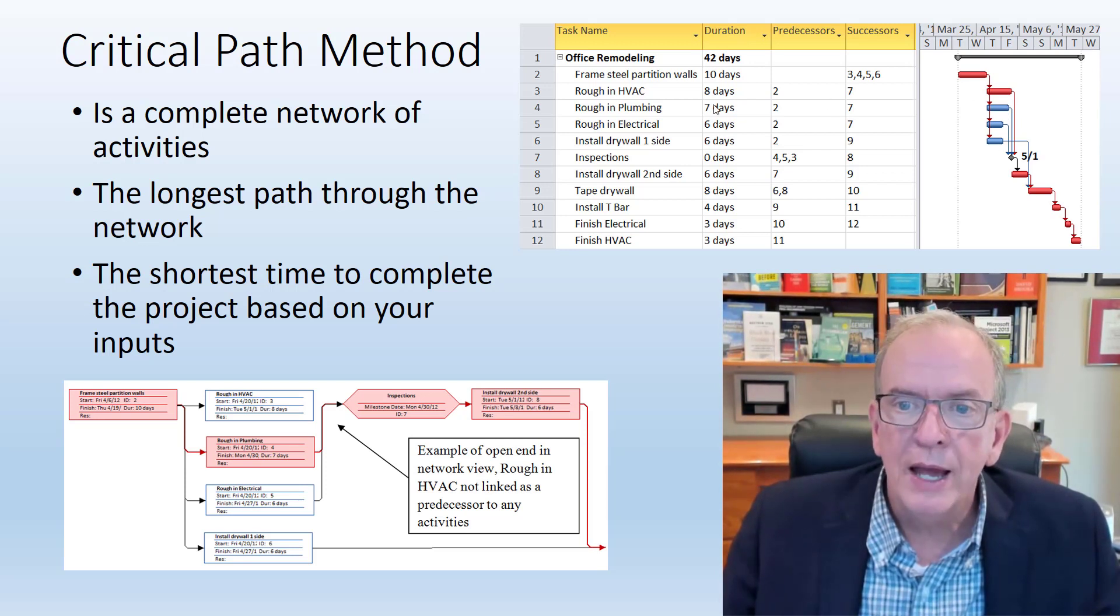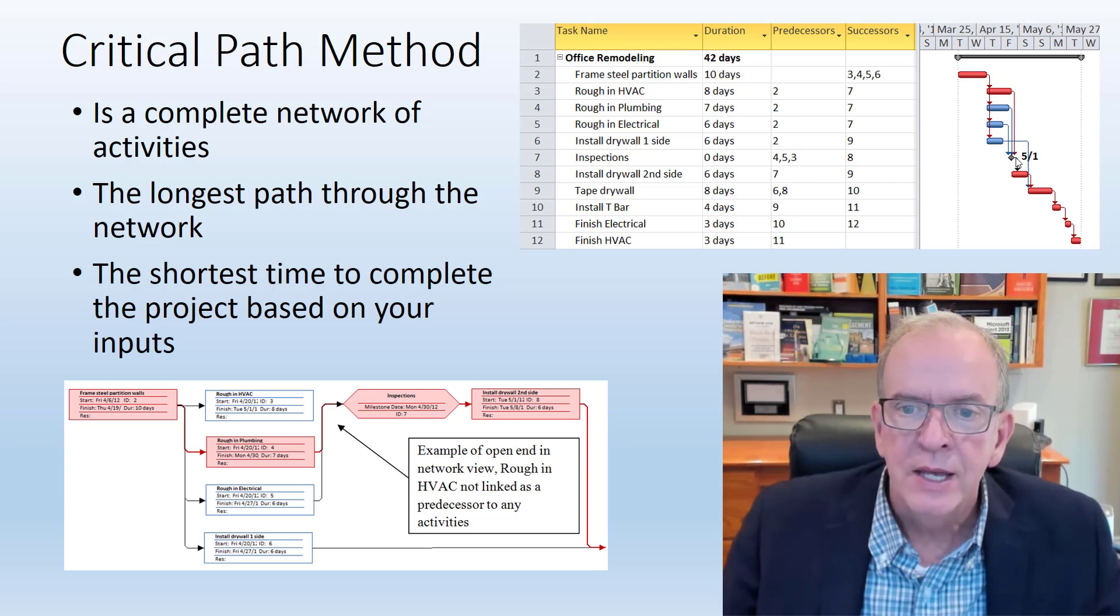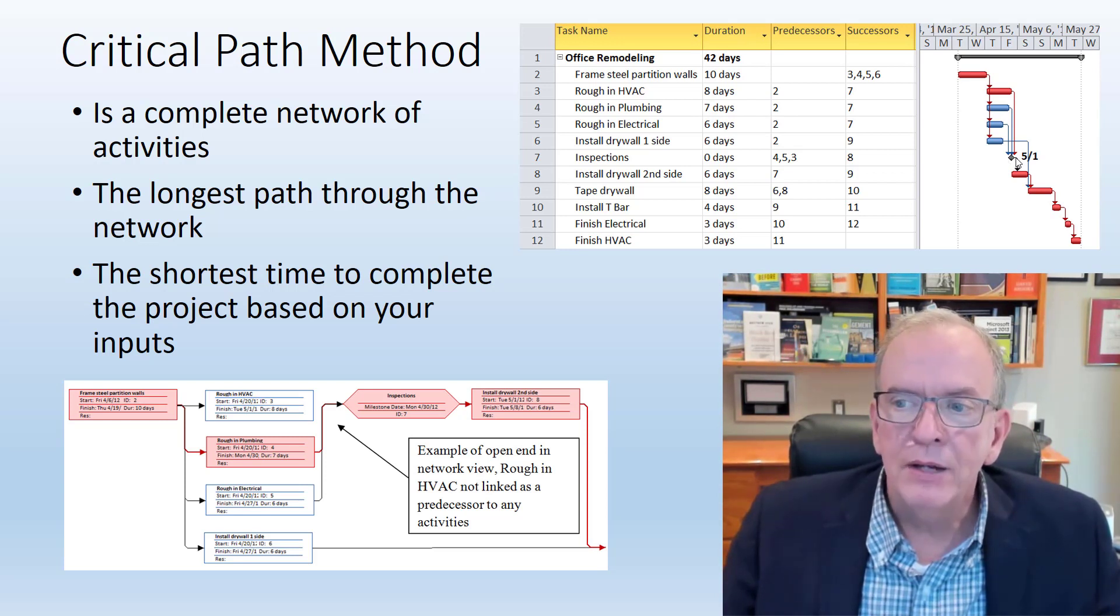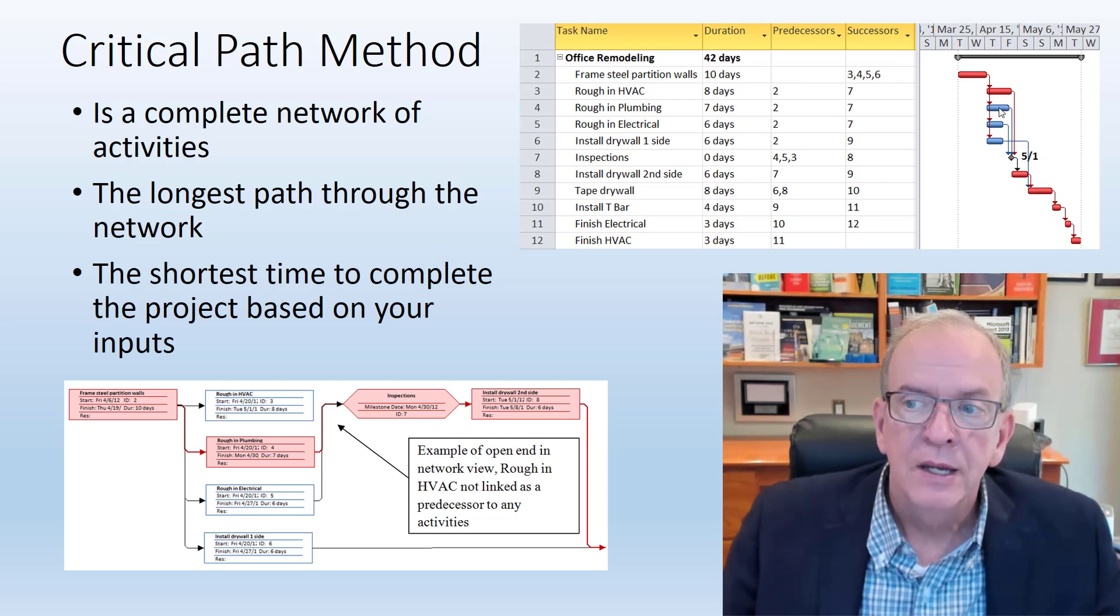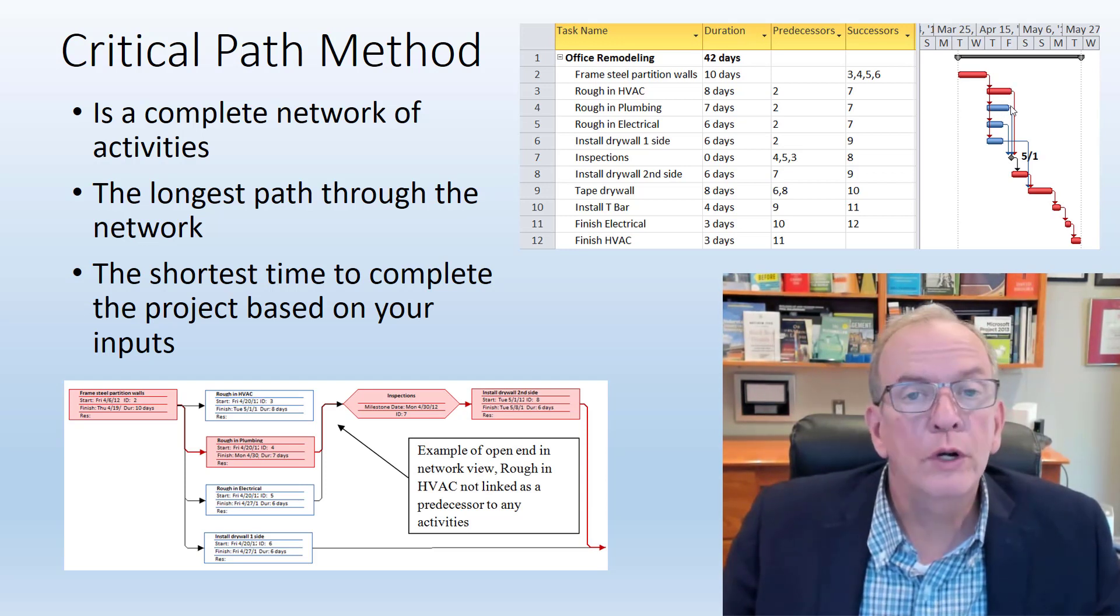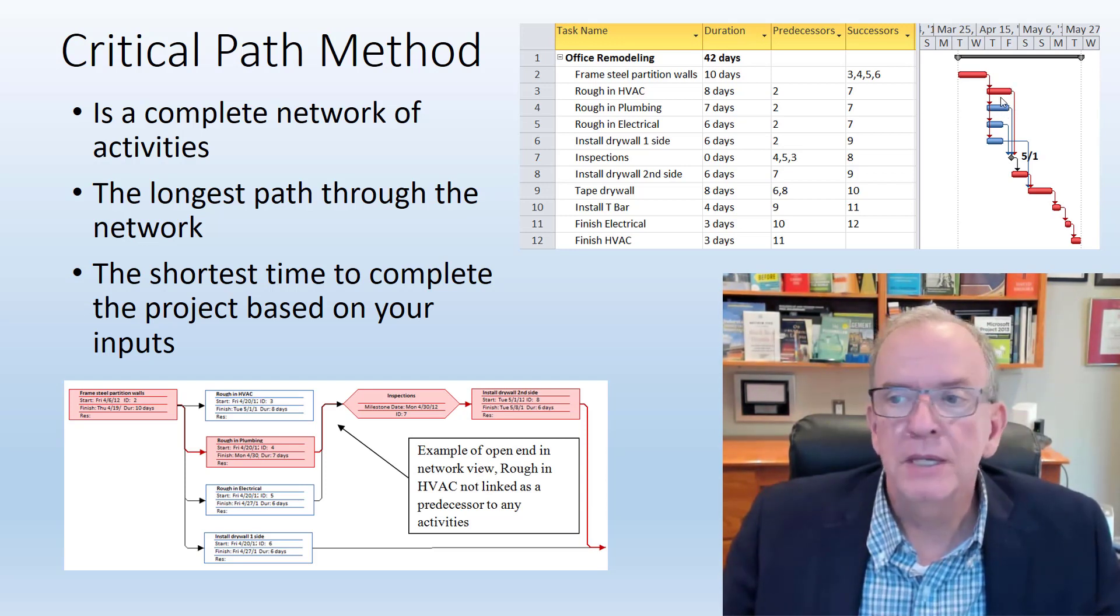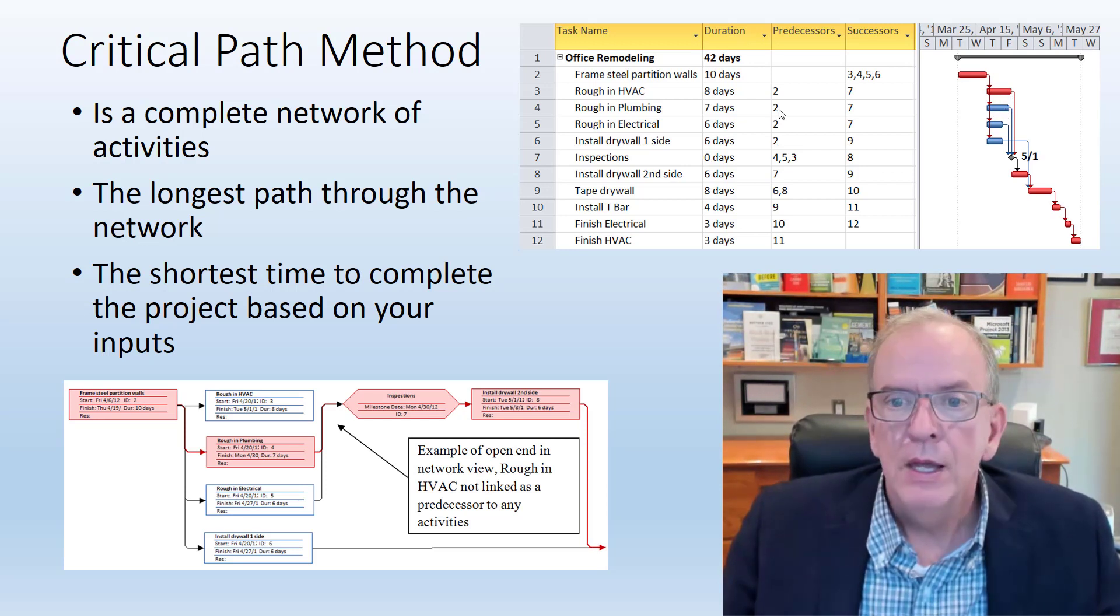I can tell that it would have one day of float because the successor activity is this milestone inspection. So it has one day of flexibility. If it took one day longer, then you'd have two critical paths because both of them would be on the longest path through the project.